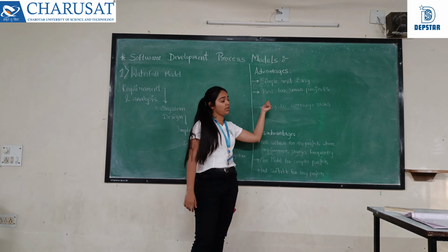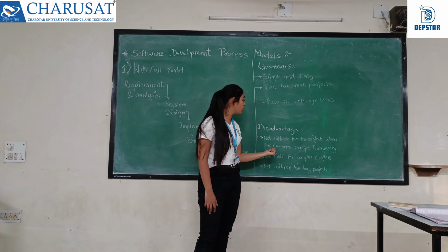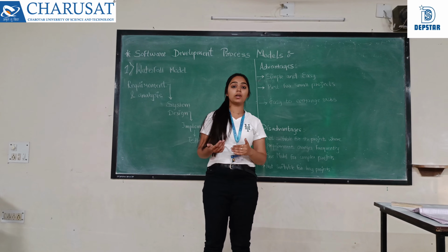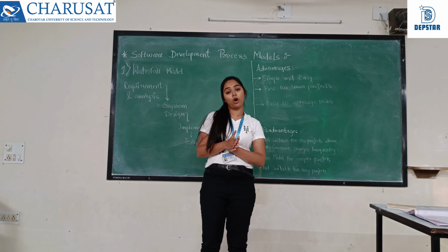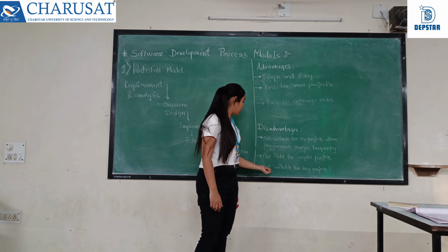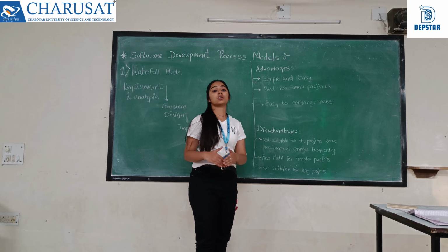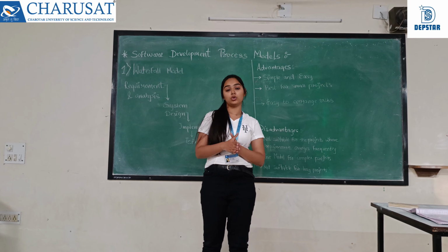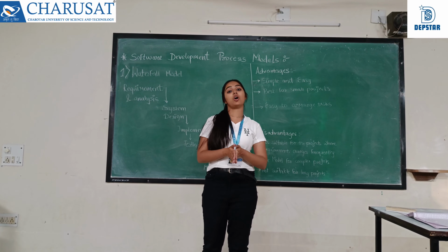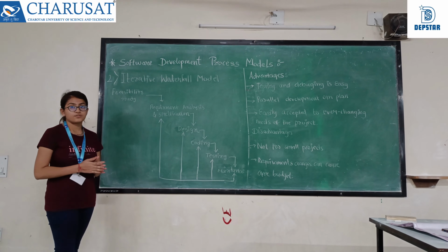As we have seen the advantages, now we will see the disadvantages. The major one is that it is not suitable for projects where requirements change frequently. If the client is changing requirements day by day, we should avoid the waterfall model and switch to some other model. The second and third are that it is a poor model for complex projects and not suitable for long projects. If your project is so complex, or simple but too long, we should also avoid using the waterfall model.